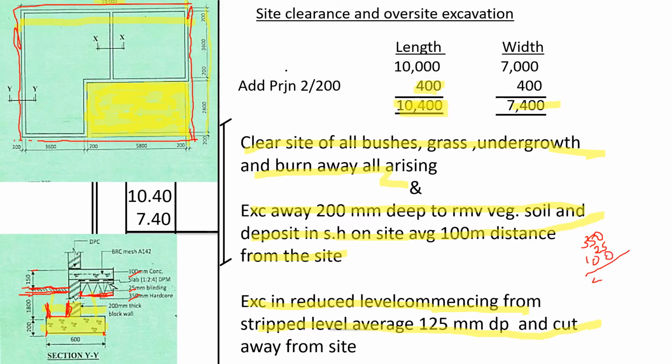So we shall get 475. 475 is the depth from here up to here. 475, we shall deduct 150 for the part above the ground to get the ground level, and we shall get 325. 325, then we shall deduct, and deduct we usually write DDT, 200 for the stripped.